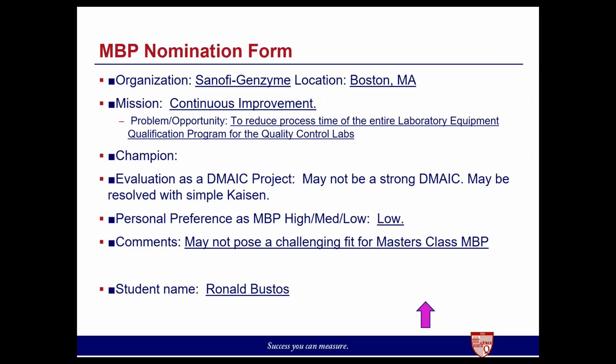Because of the holidays, I just recently had a meeting with the champions, and they want to reduce the time they're currently at by 40%, but they need to have it complete by the end of Q3. That accelerates the whole process. But that's the basic overview. If there are any questions I can answer, let me know.